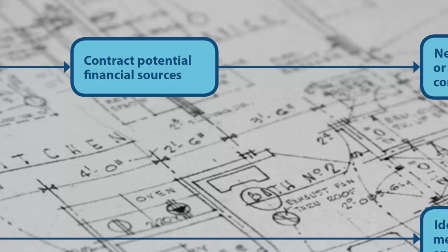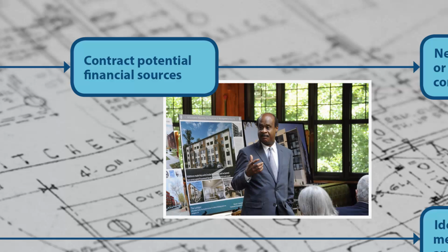A gap between total costs and commercially available financing exists in many projects undertaken and promoted by community-based organizations and local stakeholders. Quantifying that gap allows the developer to begin approaching public sources like tax credits or incentives, public financing, grants, and cost sharing, or private philanthropic sources like foundations or angel investors. At the same time, the developer will begin discussing the specific project with commercial lenders in an effort to find the best financing package available and start to negotiate transaction terms.